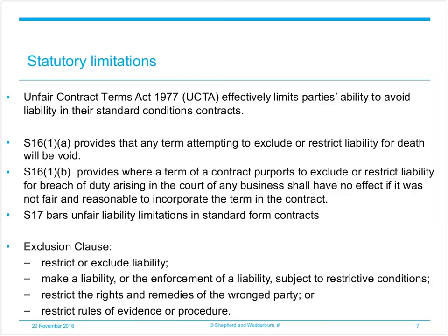If the exclusion clause is either not clear or reasonable, then it will be held to be void and unenforceable. And the aim of this double level of protection is to ensure that the exclusion clause is fair and does not leave one party with no means of recovery for loss.